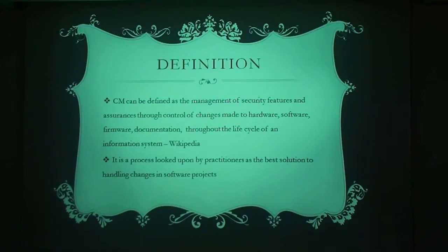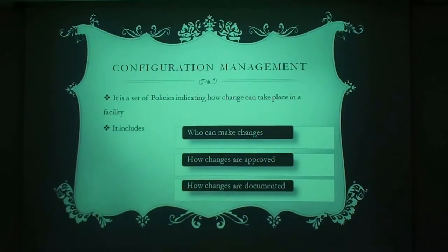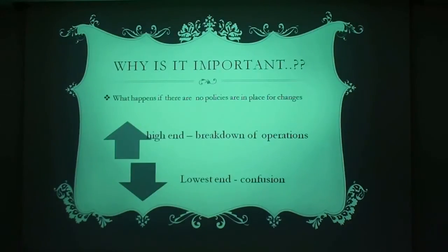Now, most organizations today look at configuration management as a process, used by practitioners as the best solution to handling changes in software projects. Configuration management is basically a set of policies indicating how changes in an organization take place. There are many aspects, but here I include the most important three, which are who can make the changes, like the personnel who is going to approve a change, how the changes are approved, and how the changes are documented.